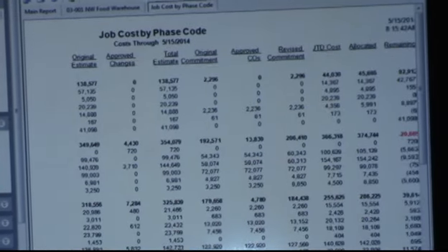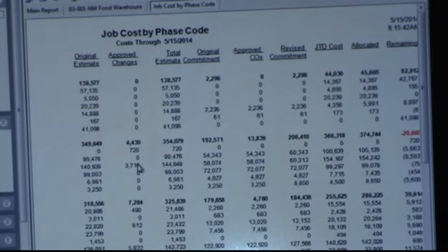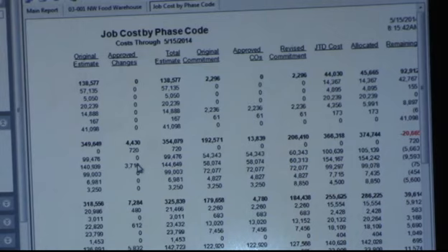And I was just saying, to sort of walk through this report, that you can enter changes to your estimate as part of the change management system, so that when you propose a change order to your customer, you can track both what you think it'll cost you and what you want to charge your customer. So you can figure in your profit as part of that change proposal. In the system, by default, it's called a change request. Some people call it a PCO, a potential change order. Some people call it a change order request. Some people call it a change issue. Whatever it is, you're putting together: here's what it'll cost me, here's what I want to charge, send it to your customer, hey, do you approve this scope of work?